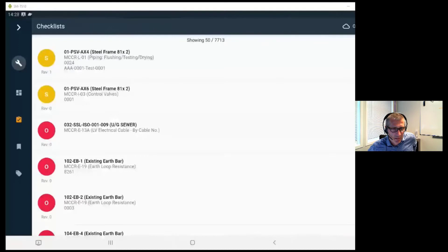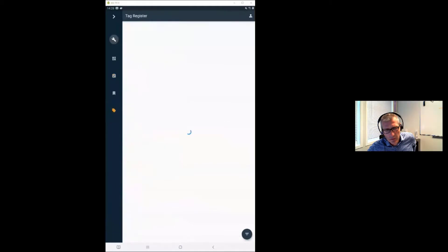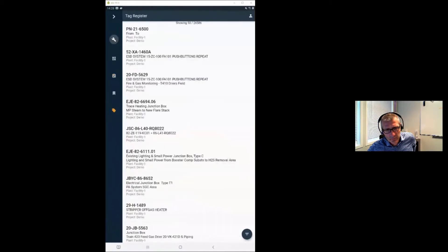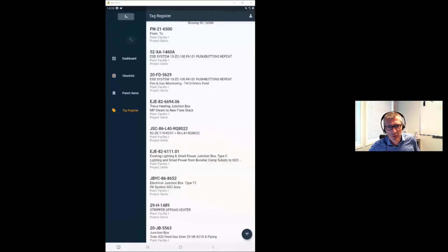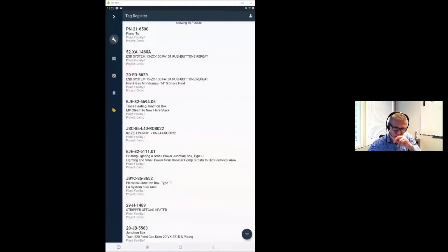The next icon is the tag register — all equipment in the whole database is in there, showing all metadata, all drawings, all punch items, all preservation data, and everything else associated with each tag.